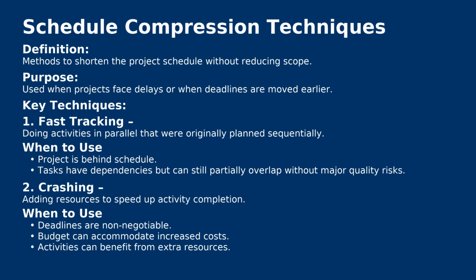You will analyze the dependencies between these activities, which could be mandatory dependencies or soft logic like discretionary dependencies. You will find out the dependencies between these activities. You will analyze and then you will decide whether one particular portion of the activity can be overlapped or the entire activity can be overlapped for the entire duration. Overlapping tasks is something which happens as part of fast tracking technique. Overlapping phases or overlapping tasks.